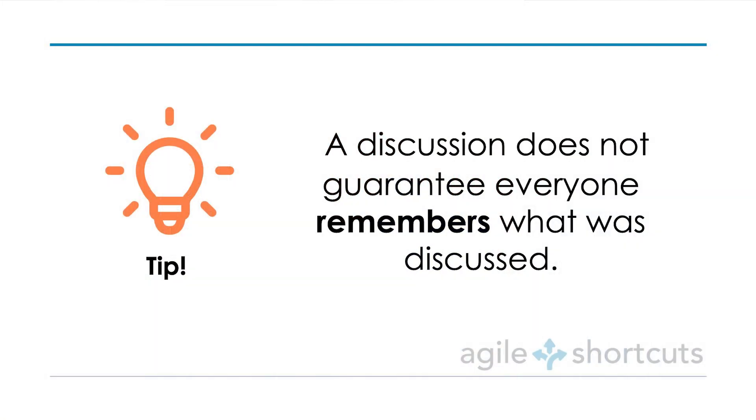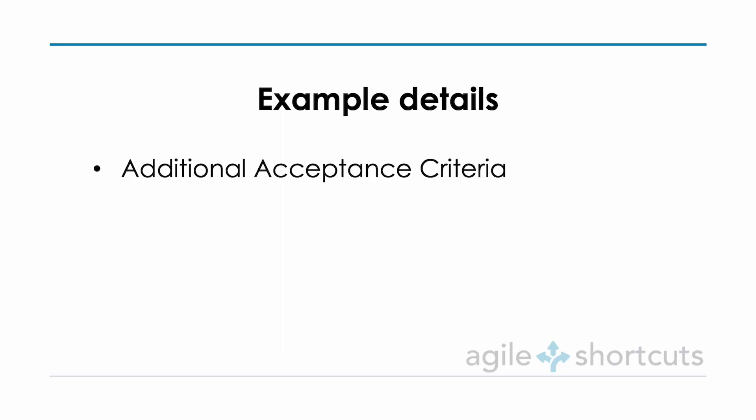While a face-to-face discussion is good to get the team on the same page, it doesn't guarantee that everyone remembers what was discussed. So we're going to add the detail to the product backlog item — the decisions that were made and the detail around the solution we're going to provide. This detail can come in a number of different forms: it might be acceptance criteria added to user stories, or business rules captured in a Google Document and associated with the product backlog item.